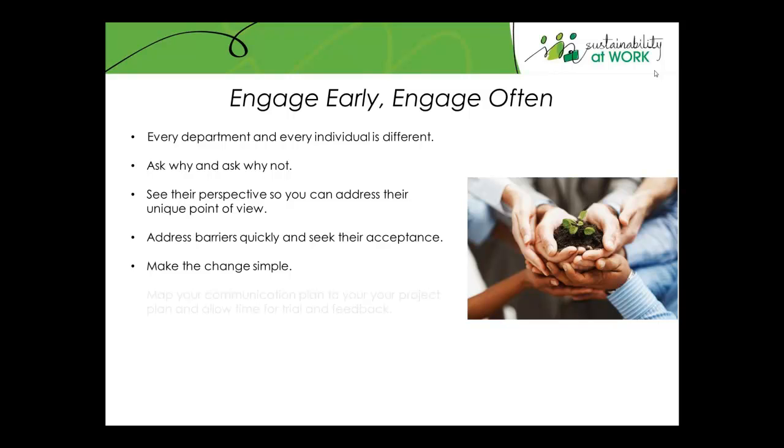Map your communication plan to your project plan. So often we see lots of IT project plan rollouts with no indication of the different types of communication strategies they're putting in place at each time. So you really need to allow for trial and feedback, and you really need to show that there is a process of communication through that project planning. If you can get that right up front, that will make your whole job a lot easier.